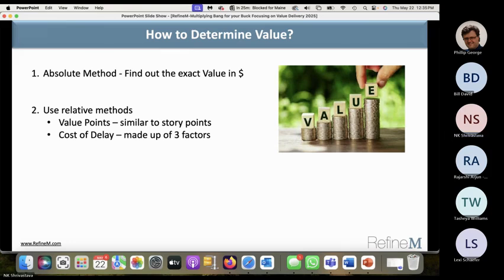If we can do it, story points, relative method, everybody has accepted that. And most teams do it, right? They don't talk about absolute. They talk about relative. Okay, and how they do it, they pick up the smallest story in the backlog and say this is one story point. And then based on that, they determine what are the other stories. It's double the size, triple the size, 5 times the size. Fibonacci sequence you may be aware of. So that's a relative sizing, right?